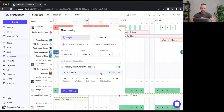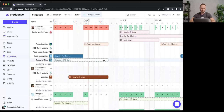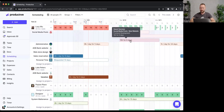Looking at my initial estimation for Front-End Development: I estimated 15 hours, haven't worked on it yet, and haven't scheduled anything yet. If I create this booking for 10 hours, I'll be left with 5 hours still to book. I'll create the booking now — it lands in Lucy's schedule, booked for 10 hours over six days using the total hours method.